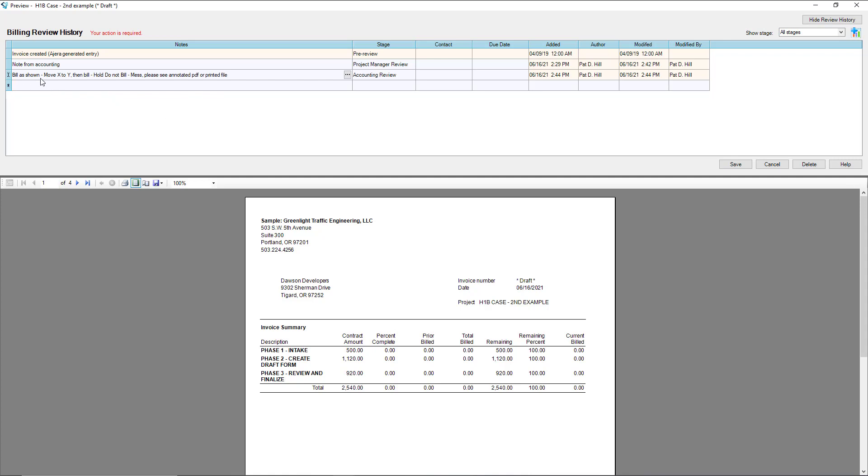We're going to put some sort of note on here. The notes could be something simple like hey this draft is good so bill as it's shown, or another option would be hey move a couple little things and then invoice the project, or another option is hey just hold this, we're not actually going to bill.